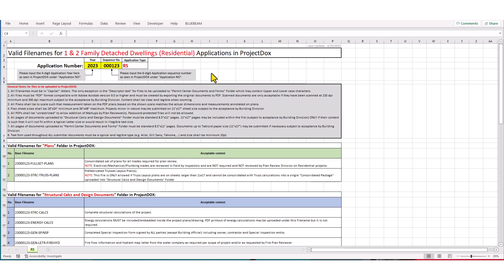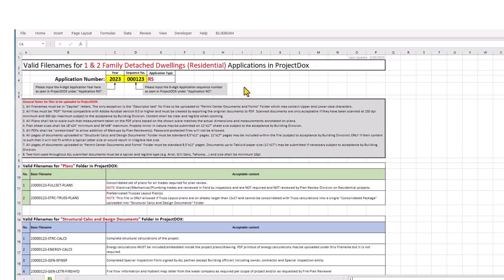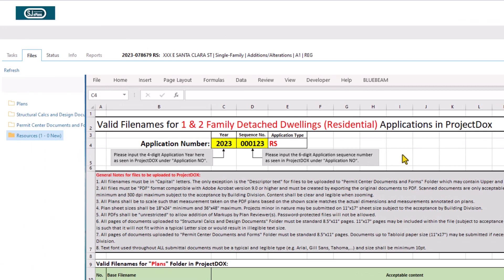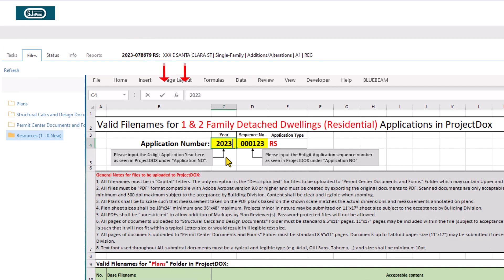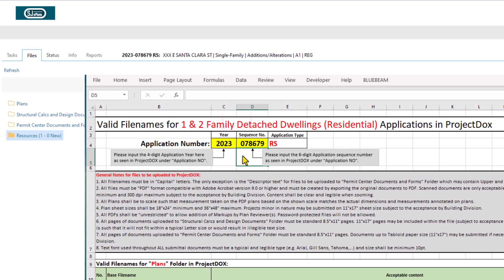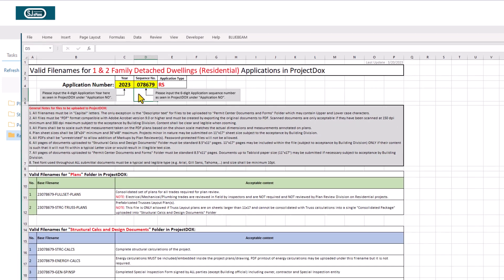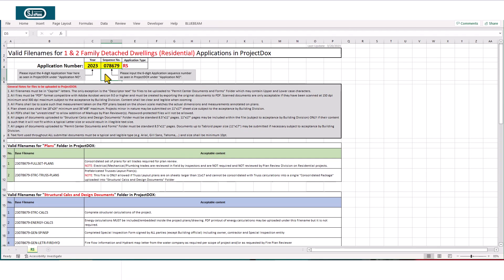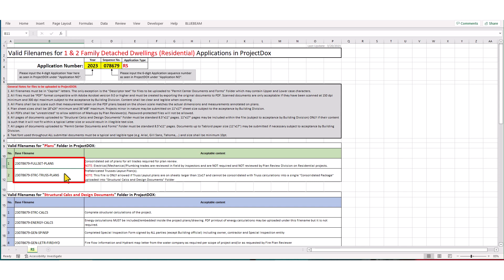At the top of the page, you will find two cells in yellow color that must be filled out. Enter the application year and sequence number, as seen in Project Docs, in their respective cells. Tables below now show the acceptable filenames that conform to building department's filenaming convention for Project Docs.